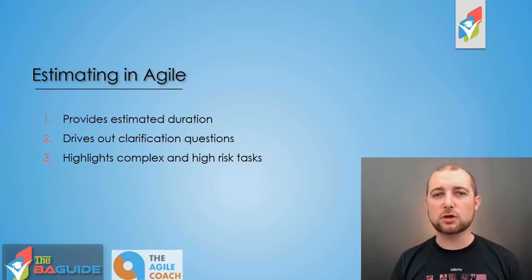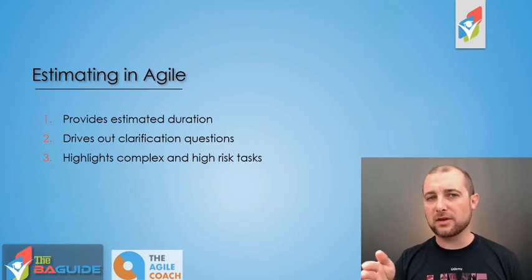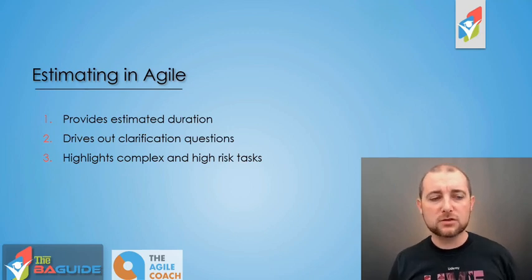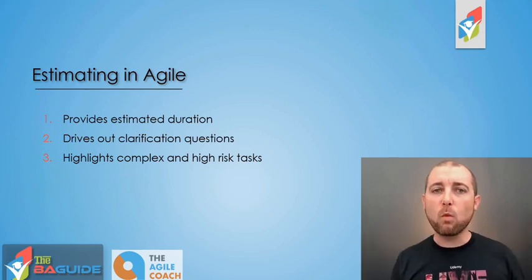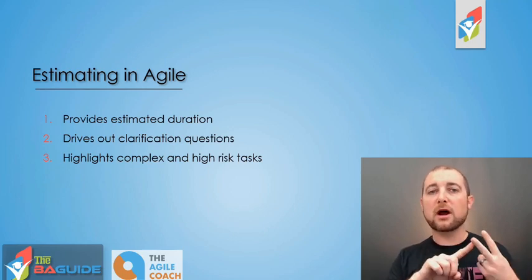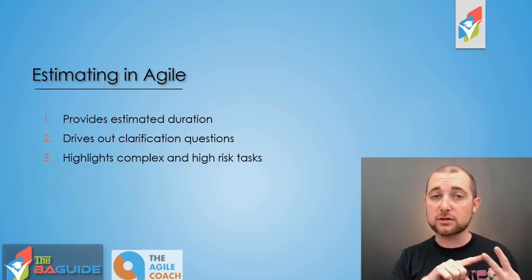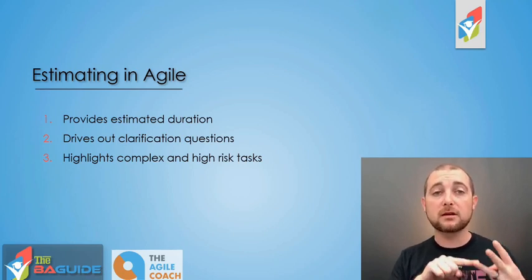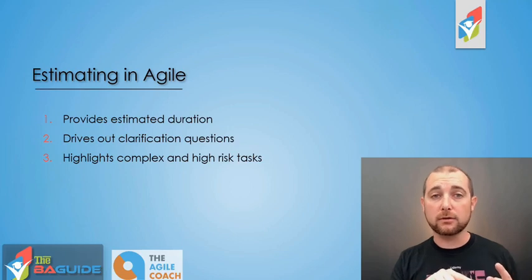Ultimately, the goal isn't to reduce the size, but it's to make sure that it's in line with expectations and with what would want to be done for the value that feature provides. So those are the big reasons why we estimate in Agile. Provides that estimated duration, drives out additional clarification questions, and can help to highlight or point out areas of complexity or high risk that were previously unidentified or unaccounted for.